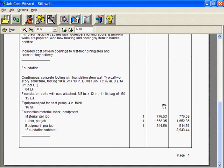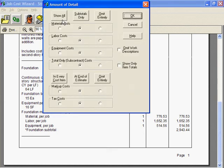That's better. On some jobs, your customer may furnish the materials. In that case, you'll want to strip all material costs out of the estimate. You could make material cost estimates all zeros, but there's a better way.